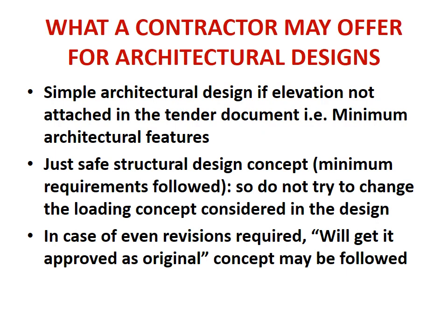Then let us see the architectural designs or drawings. Now when we call it an EPC contract, and suppose we are not giving our own architectural designs or drawings, then we should be prepared that a simple architectural design will be given by the EPC contractor because of the financial implications, and the building will have minimum architectural features.